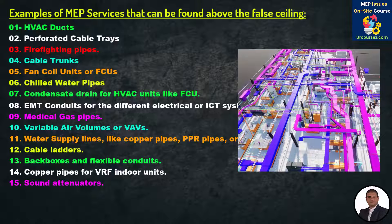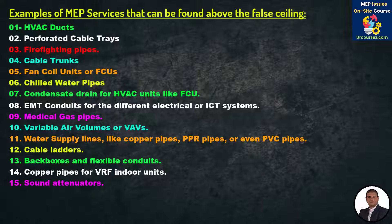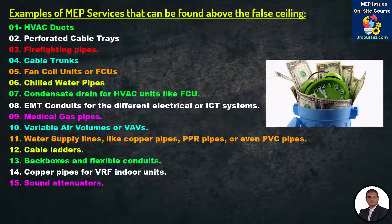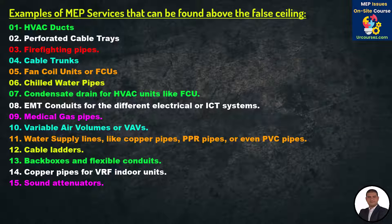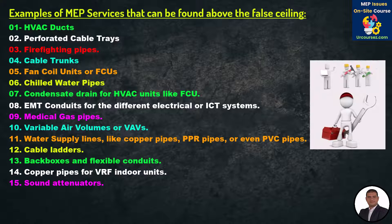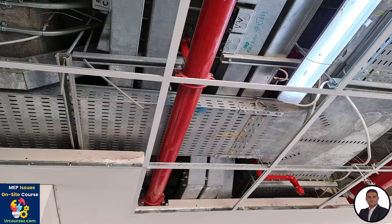The coordination between these different MEP systems above the false ceiling — in the design and shop drawing stage, before the installation process starts on site — is very important. This is to avoid any later rework, which can affect the project schedule and cash flow. Also, the coordination is very important for the client's maintenance team, as they need enough space above the false ceiling for repairing faults or installing any future needs.